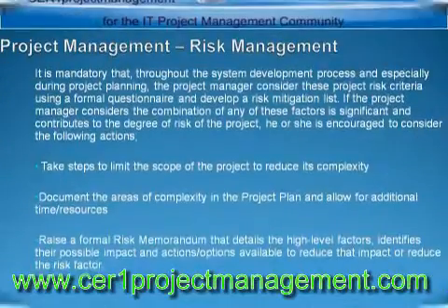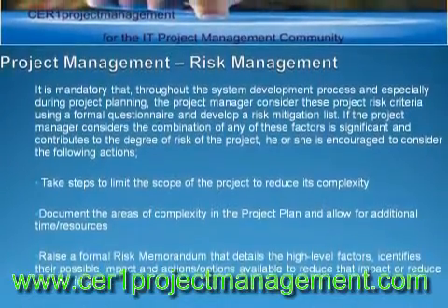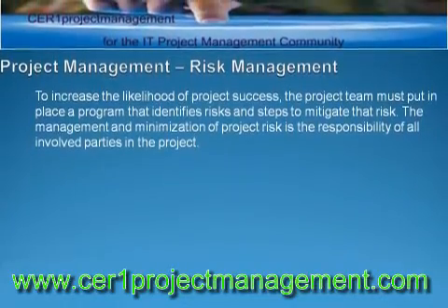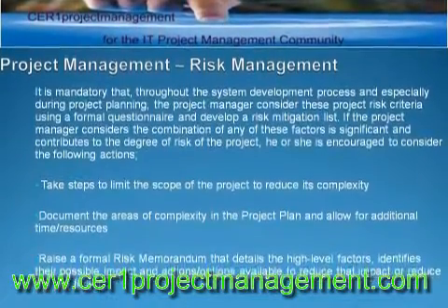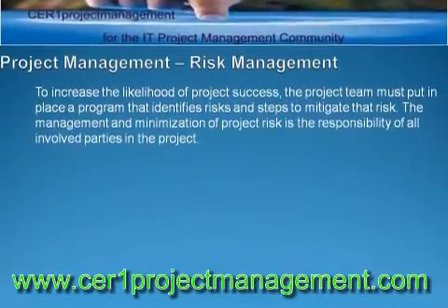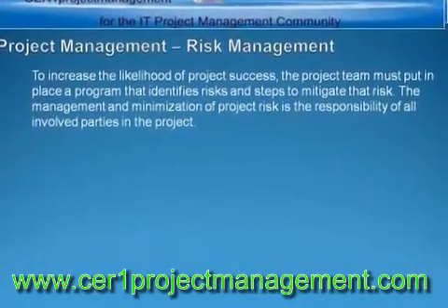Risk assessment has an obvious impact on the management style, team structure, use of methodology, strategies for system development, and, most importantly, the business decision to approve the project. Simply, the greater the risk of the project, the higher the probability that estimates, schedules, and planning will be incorrect and that the project will move out of control.